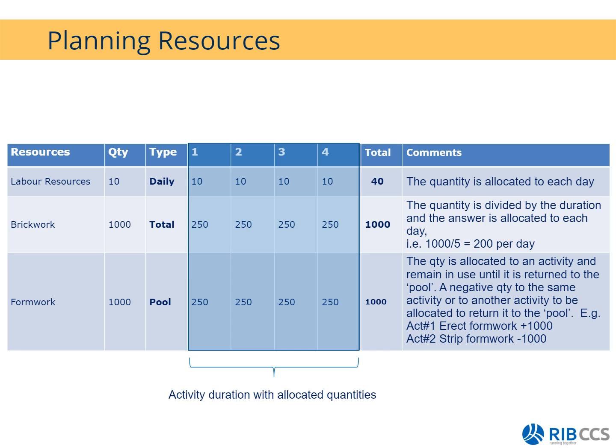In this case, it's 250. My total will then still amount to 1,000. Whether there's a delay on this activity or I try and finish earlier, then your quantities per day will just change accordingly as long as the total amounts to 1,000.